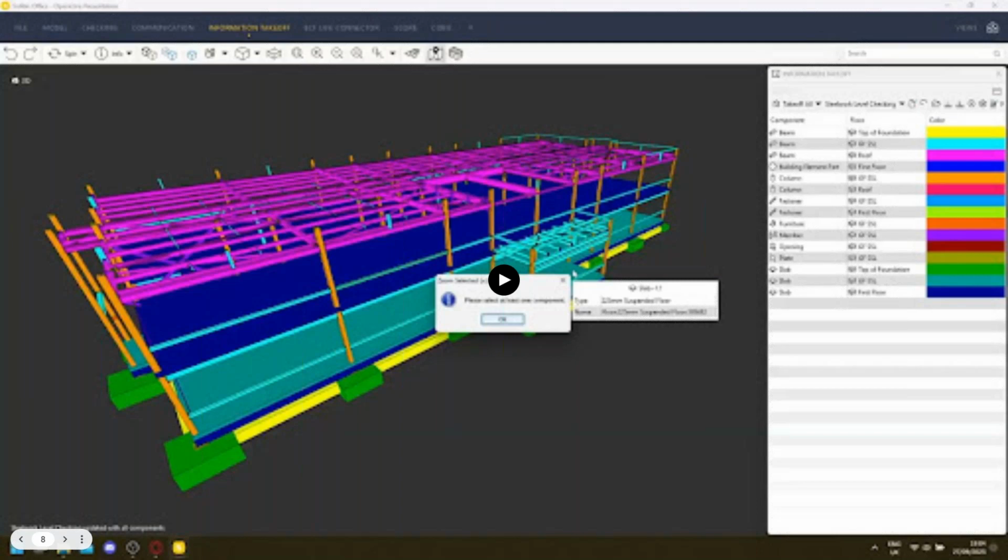That caused a lot of problems for our planners in importing and creating a construction simulation, because of the way that they arrange the model in relation to Gantt charts and so on. It means that they want accurate levels, so they can show ground floor, first floor, second floor, roof steelwork going in one by one. If we don't have a correctly structured model, we don't get that.